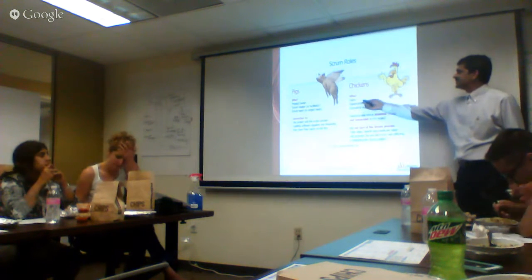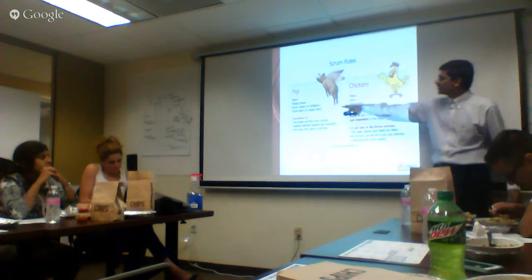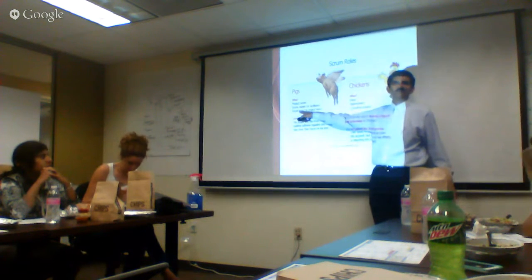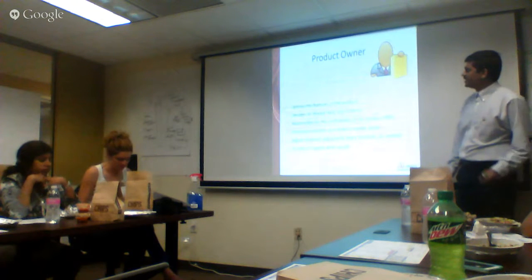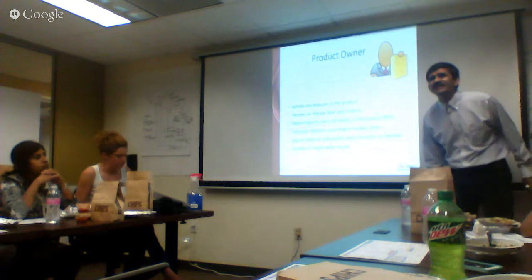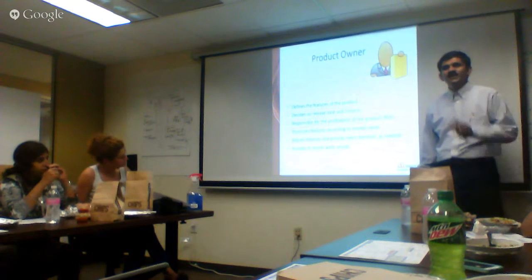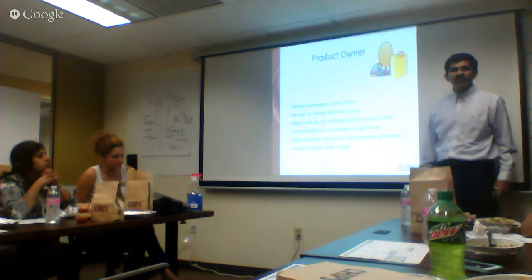So stakeholders, consulting experts, and users are considered those people who are involved but not committed. Whereas product owner, Scrum Master, and Scrum team make up the project team. Scrum team is a little different than a project team because Scrum team covers the product owner and Scrum Master too. It's just a development team. So product owner defines the feature of the product, decides the release date and content, responsible for the profitability, return on investment. It's just like an investment agent. You know what an investment agent does? He tries to maximize the rate of return on your investment. Similarly, he works with the sponsor to maximize the value of what you're investing in this team.